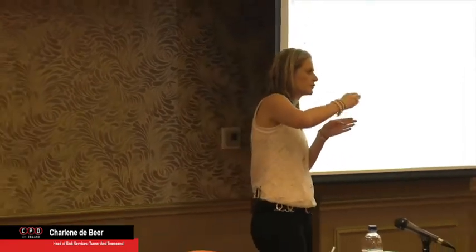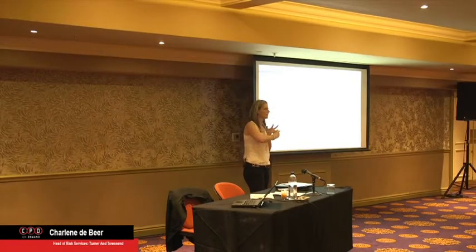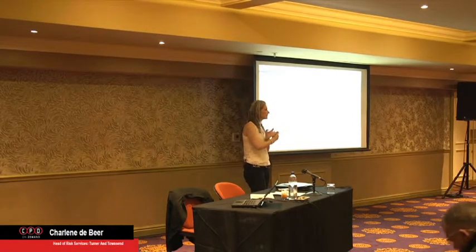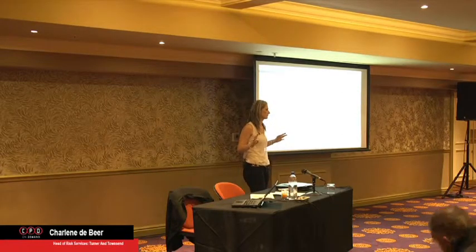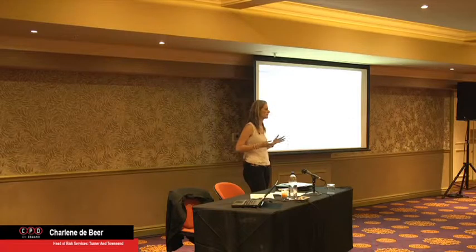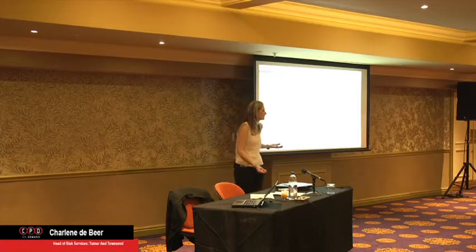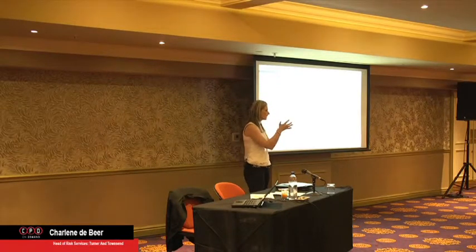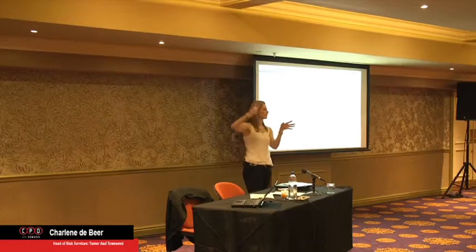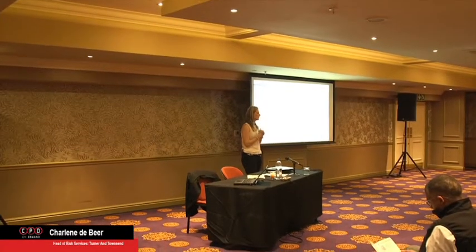So those 40 weeks just compounded, and all you do is face another strike season, another rainy season, another builder's break. We all know in December you lose between 4 and 6 weeks. Shut. Even if the guys come to site, I've never worked on a construction site where the skeleton staff was 100% productive. It's just not the way it works. So a 40-week lead time item, which was supposed to have been placed long before, delays the schedule by 3 years.